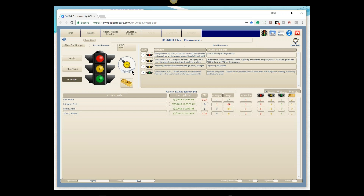Right next to that traffic light is the Schedule Gauge. For the selected area of responsibility — in this case the entire department — we're running an aggregate 44 days behind schedule against our plans. Each plan has a beginning date, ending date, and percent complete at the activity level; the system calculates and aggregates all of that. We're at yellow because it's less than 60 days behind — it would be red above 60, green if on schedule. This could be filtered to just the strategic plan to see how that specific plan is tracking.